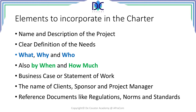The things to incorporate in the Charter are, first of all, the name and the description of the project. The name should not say anything about the project. We all know the Manhattan Project — it has nothing to do with Manhattan; it was the creation of the first nuclear weapon in the United States. Projects have to be defined in a way that a need is realized. Defining the need that the project will solve is very important.